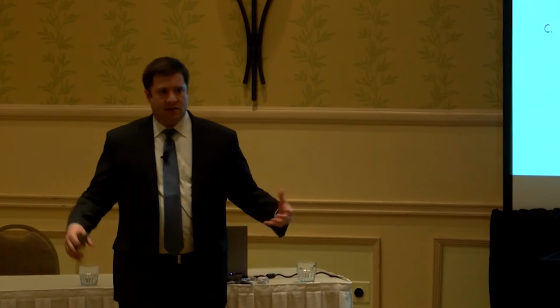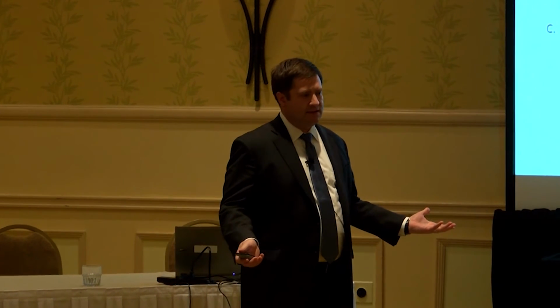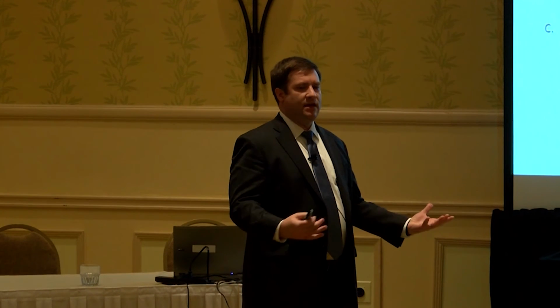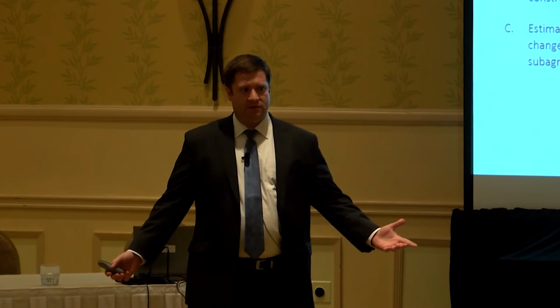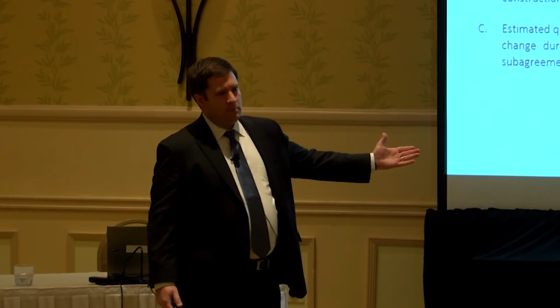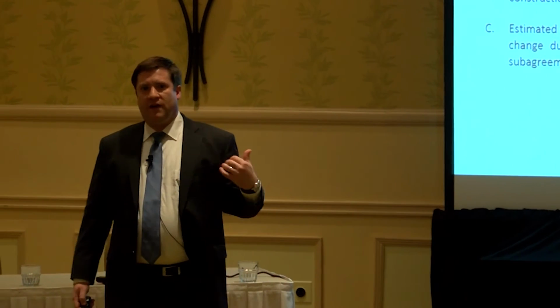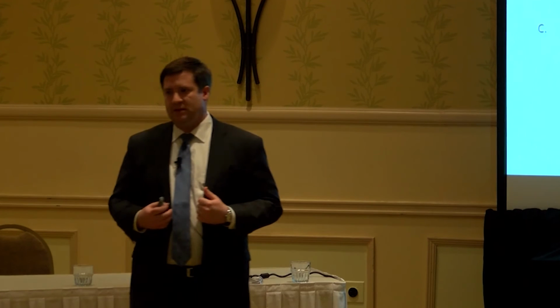One of the biggest causes of claims that we're hearing from the professional liability providers is where the contractors have based their bids off a number that they have estimated off of a preliminary set of plans. As the design naturally advances, that number might increase or decrease. And the design builders are using that as a basis for saying that it is a professional liability claim because you've changed your design. If you look at the design bid build world, where they're typically bidding off final construction sets of plans, that's a big difference from an engineer's perspective between design build procurement versus design bid build procurement.